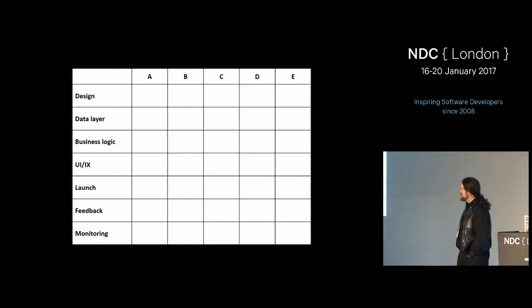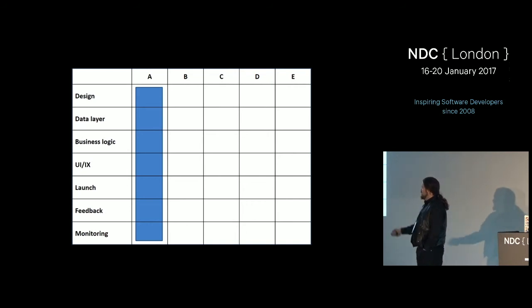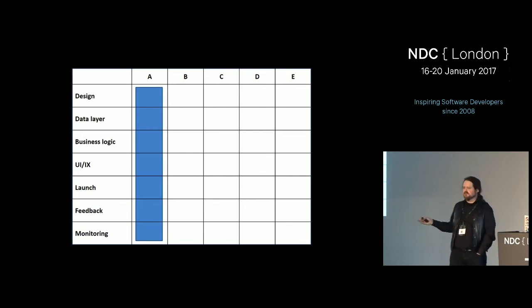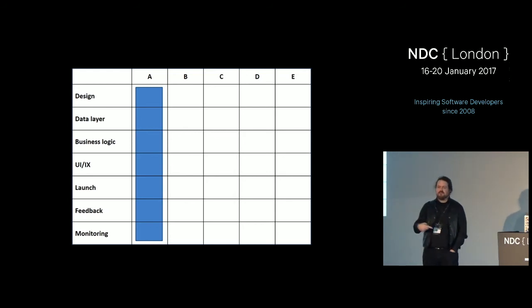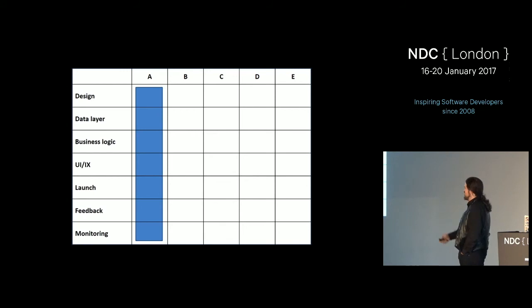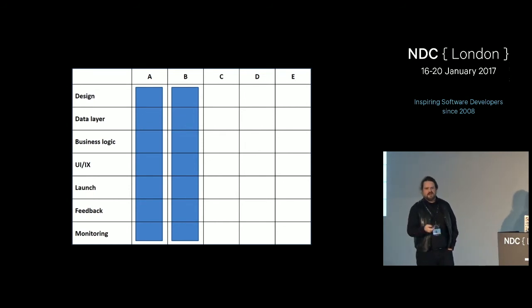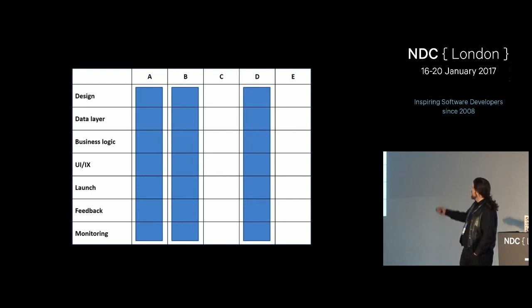What if you did it this way? Pick a feature, one thing that is actually useful, and ship that all the way to production. Instead of getting hundreds of nasty tweets, you'll get tens, maybe 5, maybe none if it's small enough and you've got the people involved so that they know that you're still knocking the edges off. Talk to them, see what it is that they want next. Brilliant. They want that. Now, based on that, you realize that your original vision was wrong, and actually the next thing is not necessarily to go A, B, C, D, E. You're going to jump and you're going to ship this thing next.